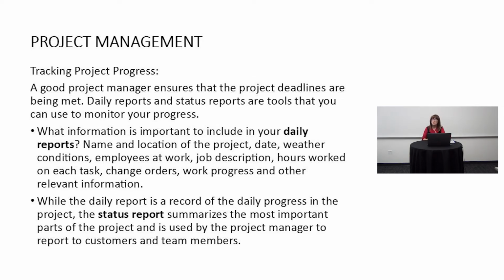While the daily report is a record of the daily progress in the project, the status report summarizes the most important parts of the project and is used by the project manager to report to customers and other team members. So we have a daily report and a status report used by the project manager.